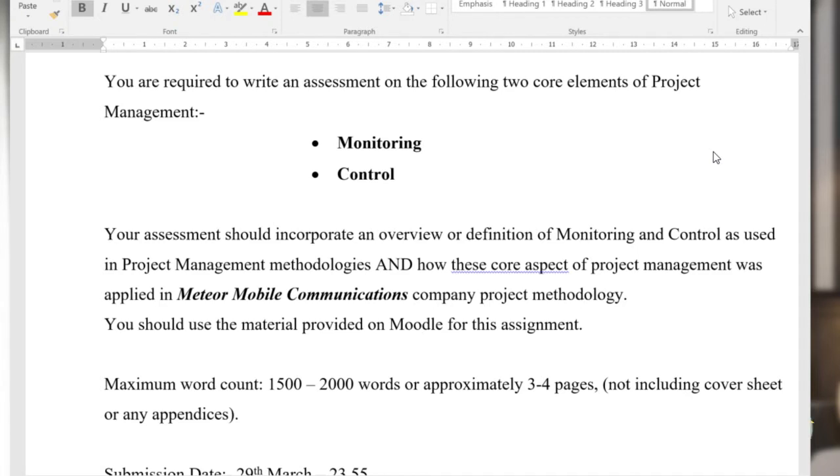So you use the material and the diagrams and the PowerPoints to pull diagrams out to explain the flow from start to finish and how you're monitoring and controlling, and build in the concept of earned value management as a continuous monitoring and control mechanism that we use at project meetings. So if we have project meetings every 2 weeks, then we'll do an analysis. Or if we have them every month, then we'll do an earned value report as well.